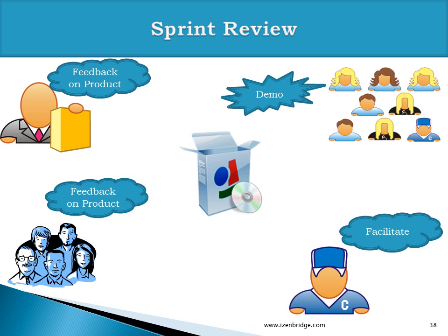So the team demos the product. The team shows that this is what we have developed in the last 1 month or in the last sprint. The product owner and stakeholders can provide feedback on it, and the Scrum Master is there to facilitate the sprint review. He's the one who sends the meeting request. He's the one who ensures that the meeting happens, that all the infrastructure and logistics are in place, and he is the one who also schedules the next sprint review. So at the end of a sprint review, the Scrum Master should also broadcast the date and time for the next sprint review.